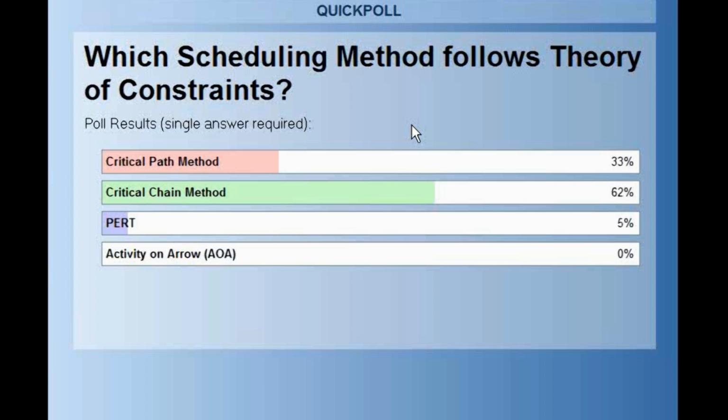We use the critical chain method when we don't have a predictable way of estimating duration, when there is no defined way of accurately estimating a duration. Because in the absence of a defined and statistically verifiable method of estimating activities, if we tell people to estimate activity with very much surety, they may end up putting too much buffer. So when we are working in a volatile or not that stable environment, we work with uncertain, aggressive estimates. And in those environments, the critical chain method becomes useful.